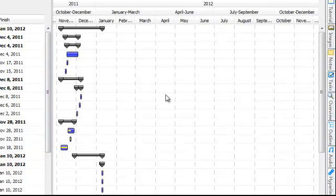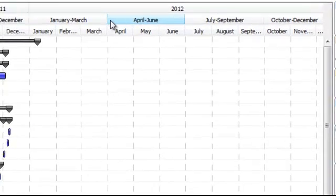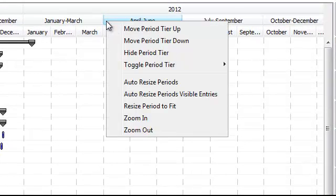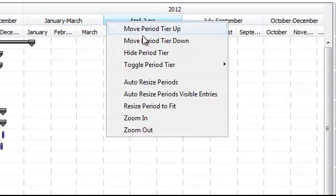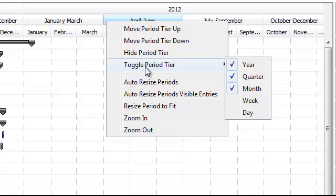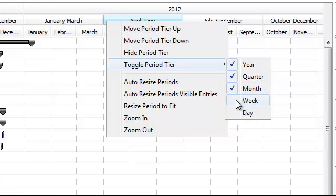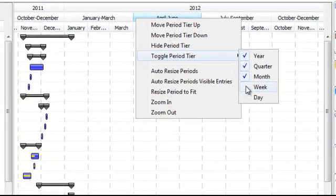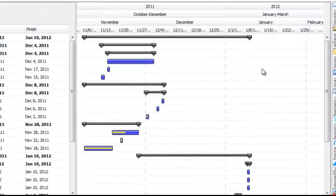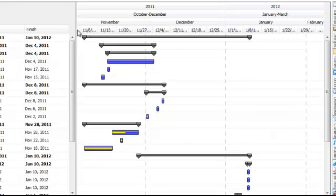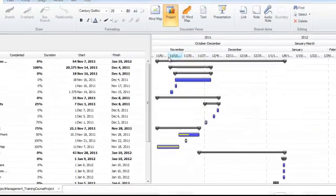You can customize your Gantt chart by right mouse clicking on any of the buttons or tabs and you can toggle period tier and change this whether you want it yearly, quarterly, monthly, week or day. So if you've got a more short term project the week or the day view may be more applicable. Here you can see I've now got the week task tab aligned on the top toolbar here.